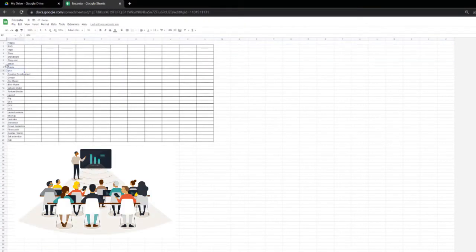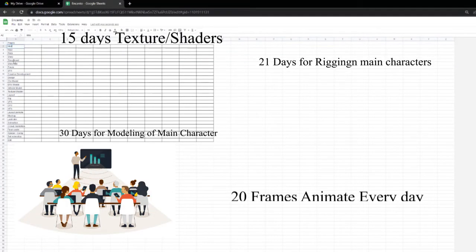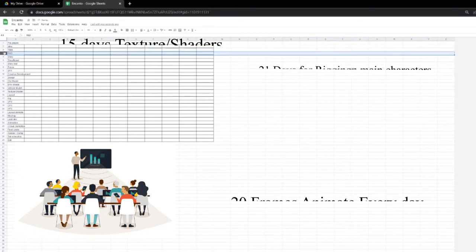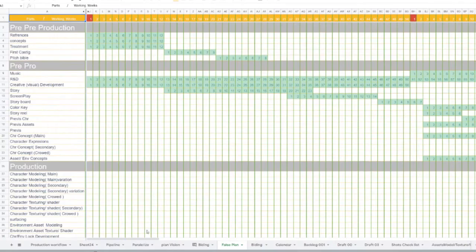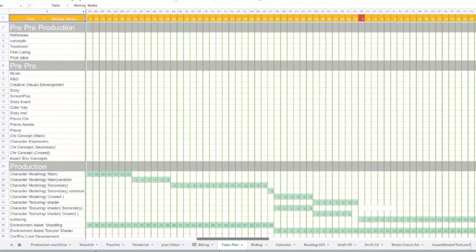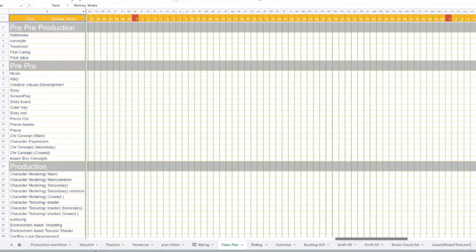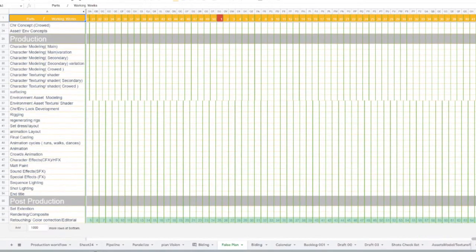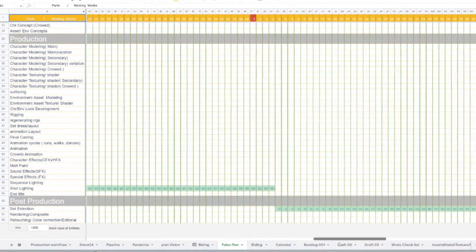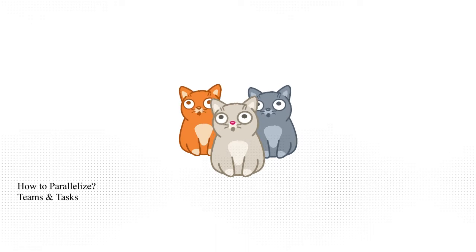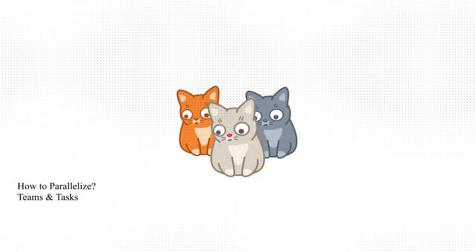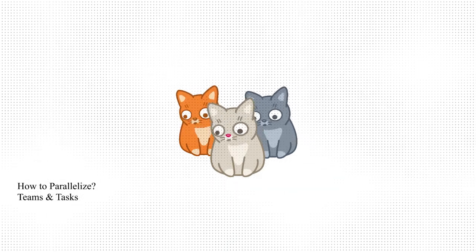Now have meetings with your heads and ask for a rough estimate about every part. Put them on your table and don't forget to add contingency. By just putting items after each other, we see we need around 10 years. This is not good at all. Now this question comes to your mind: how could we make it in 3 years? For sure, you don't have just one option for answering this question. Together, we will take a look at some circumstances and see what works best.